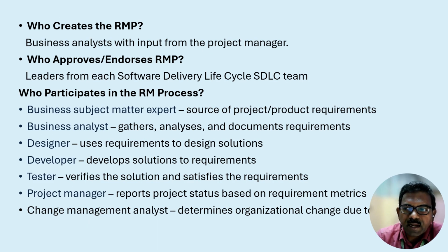Now, who creates this RMP, the requirement management plan? The business analyst, with inputs from the project managers. So it is a joint activity by the project manager with the business analyst, who design this RMP. And who approves it? The leaders from each software delivery lifecycle, SDLC, team. The SDLC team will go through it, endorse it, and approve it with joint discussion, obviously with the project manager.